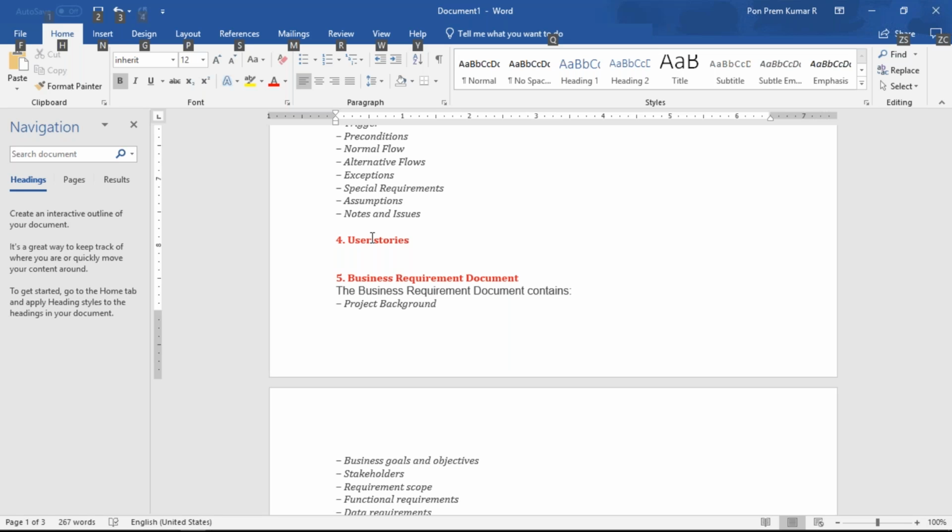In a planning poker session, you know the user story topic. You need to explain in three to four lines the purpose of the user story and ask them the story points number. In planning poker, everyone will be having cards.